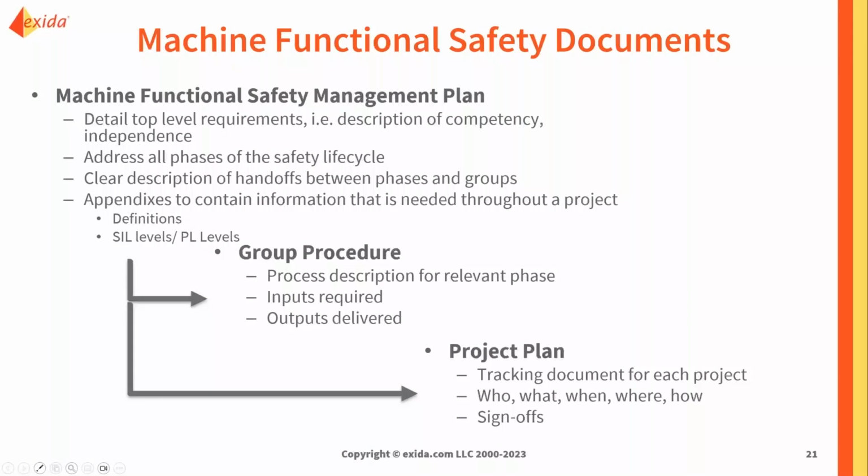And then lastly, on the project side, for a specific machine that's being implemented for a specific uplift or upgrade program, looking at the project plan, tracking each document for the project, the who, what, when, where, how, making sure we know who completed a task, exactly what they did, when they did it, where it's stored, and how that feeds into the rest of the life cycle, tracking the sign-off. So all of that is really important to having a rigorous program and tracking all of that information.